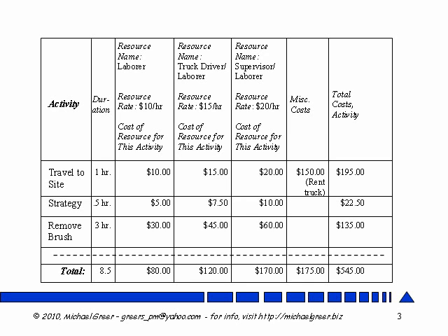So at this point, we simply multiply the rate of pay that someone is making times the number of hours of labor they're putting in and come up with the cost of that person's labor. For other costs such as rental of a piece of equipment and so forth, or purchase, we can plug those in a separate spot in the cost table and total up all the costs for each phase, for each activity, and a summary of the overall project cost.